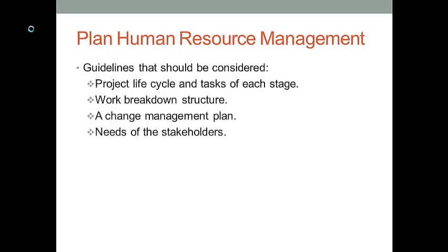When we develop a human resource management plan, we need to consider several guidelines. For instance, we need to look at the work breakdown structure of our project so that we can identify what types of human resources we need in order to accomplish the specific activities. We need to look at the project schedule so that we can identify how long each human resource is needed. We also need to look at the stakeholders' needs.